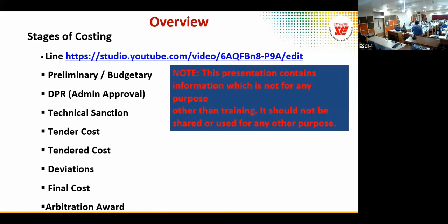Whatever components we have incorporated, like MBS has 17%, some states have 15%, contractor's profit and overheads, that component is always less compared to actual overheads. So currently, within 3 months, the cost of bitumen has risen from 52,000 to 1 lakh 4,000. In the current situation, what will this DSR do?